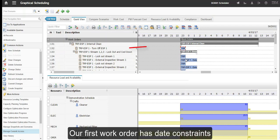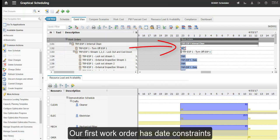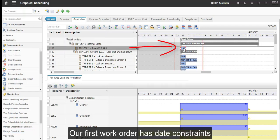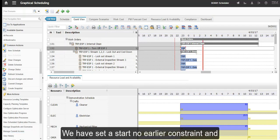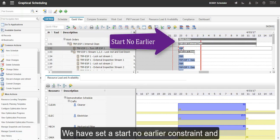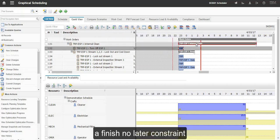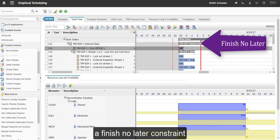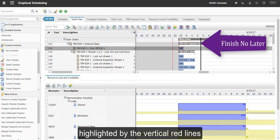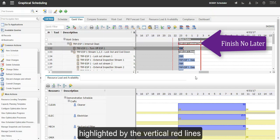Our first work order has day constraints. We have set a start no earlier constraint and a finish no later constraint, highlighted by the vertical red lines.